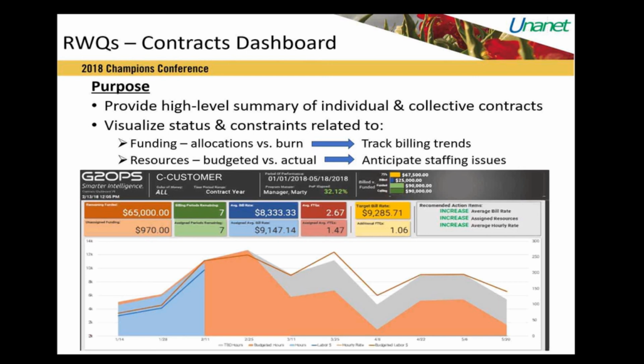test reports. You can see that for a particular period in time, if this is the full pop, the blue representing what our actuals are, the red representing our personnel that are in place, with the gray representing the TBD assignments that we have. So this gives us a real holistic view of where we stand with a particular contract and period of performance, to see how we either need to crunch or crash the project, shift resources, or go on a rapid hiring spree, which has been something we've been working on here of late.